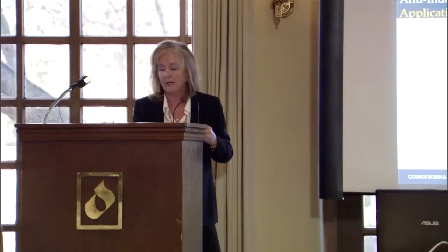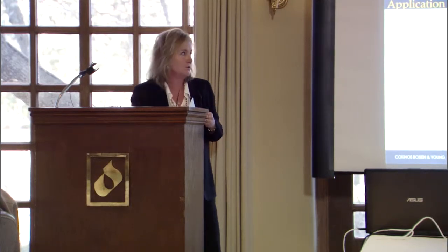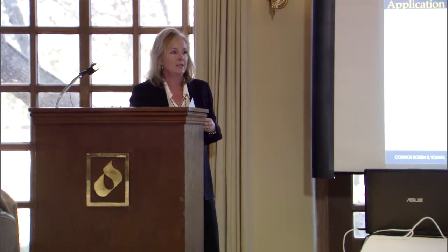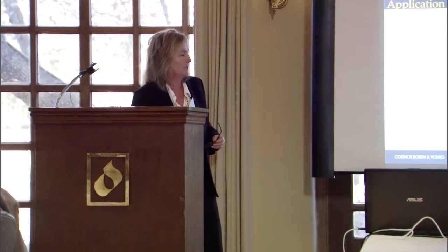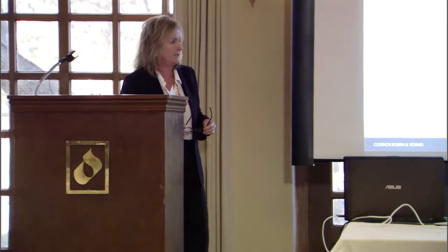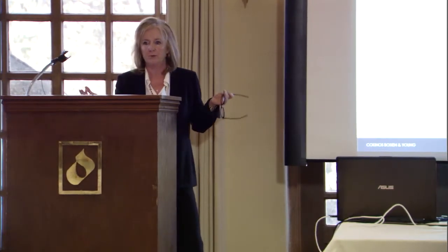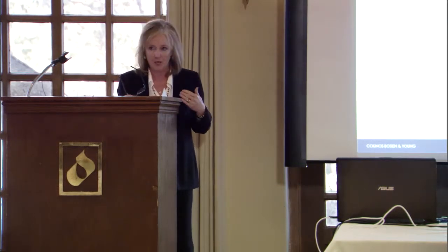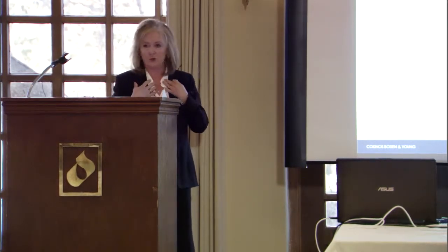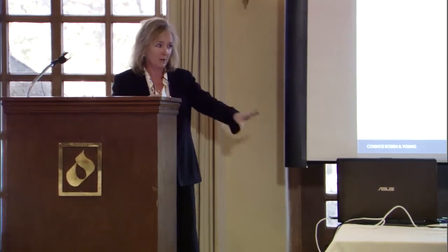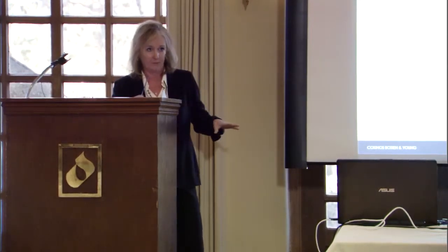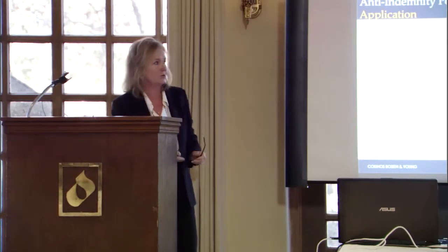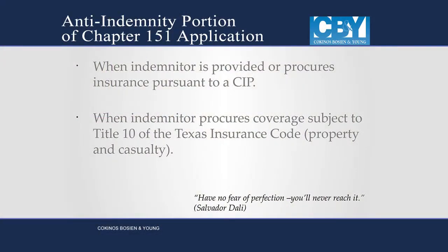The legislature decided the laws for indemnity were way too complicated. Too many lawsuits, too many things for everybody to remember, too many technicalities. So in 2012, the new indemnity law came into effect. And the new indemnity law basically says everybody's responsible for their own acts of negligence. So if I do something on the project, then it's my proportionate share of negligence I'm responsible for. Subcontractor, you're responsible for your own proportionate share of negligence. Owner, you're responsible for your own proportionate share of negligence. So this way it was going to be fair across the board.